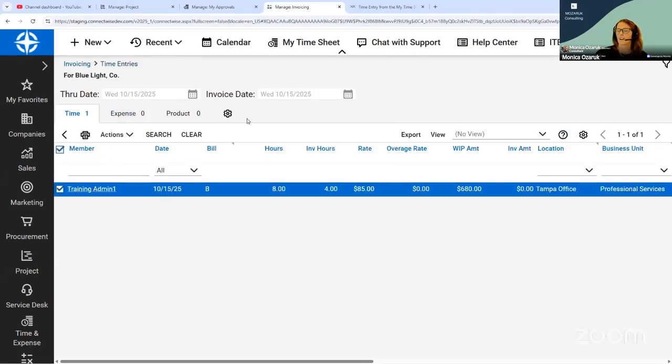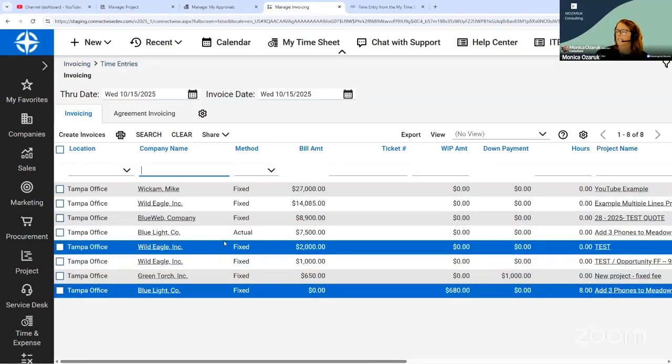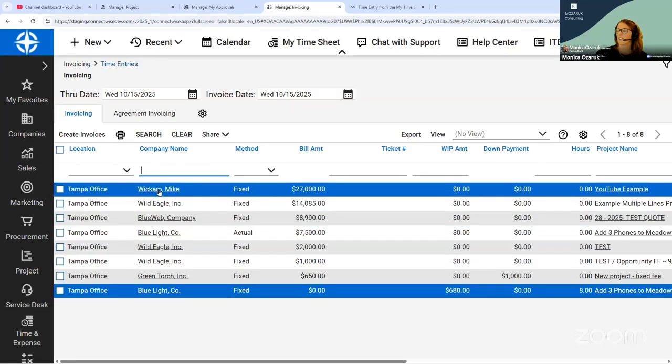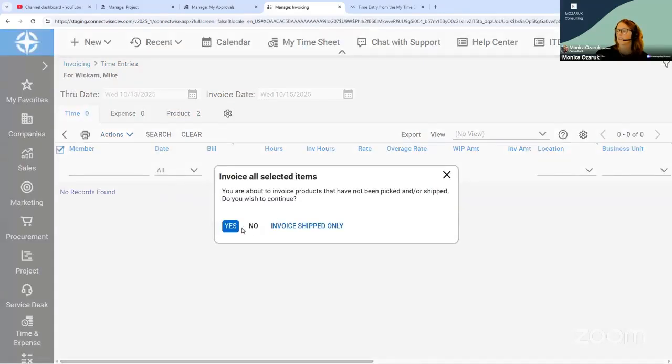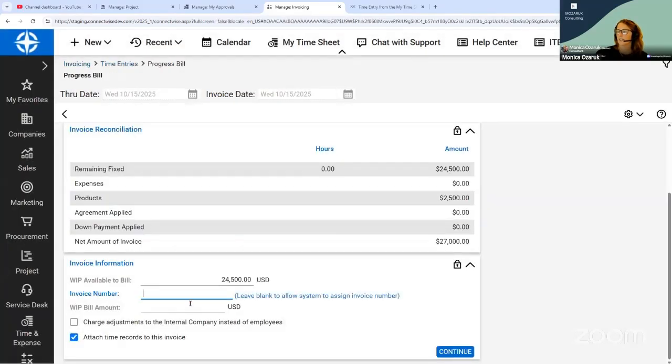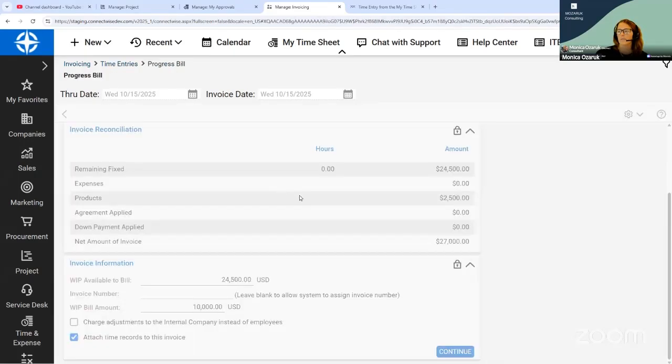All right, so those are invoice hours, invoicing, etc. Once we have completely invoiced out and done all the progress bills for our fixed fee projects, so let's do our YouTube example. We're coming back to this one. We have products now. We're going to create a progress bill. We're going to invoice all those products that are there. You cannot overbill when it comes to projects.